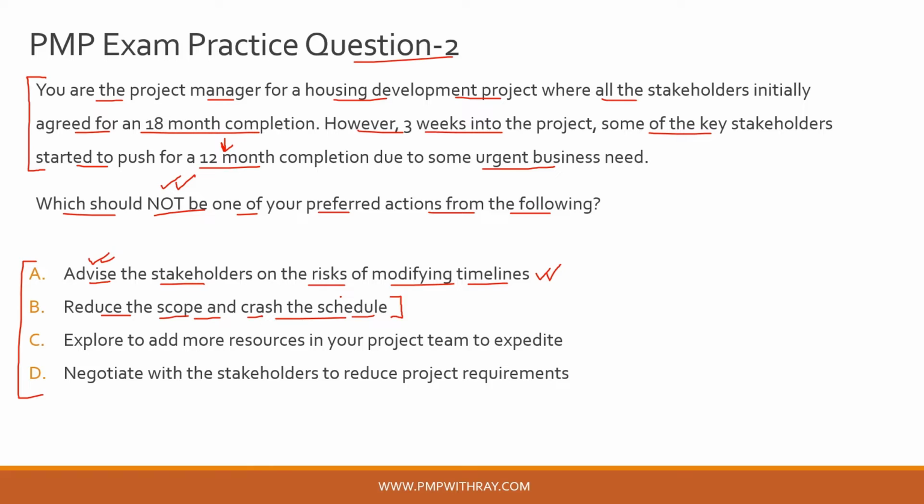But I hope you know, guys, that crashing comes with a risk on cost as well, right? So you need to keep those in mind whenever you are applying that method of crashing during a schedule compression scenario. Okay, but anyways, let's hold this option for now. Let's not eliminate it. Let's look at option C.